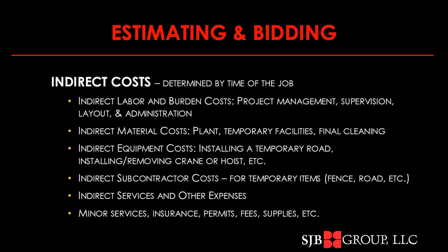Perhaps our final cleaning is a separate operation. Our indirect equipment costs may include the installation of a temporary road. If we're bringing on a job site crane, it's got a cost to move it in and take it out.